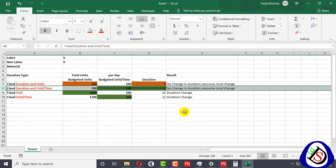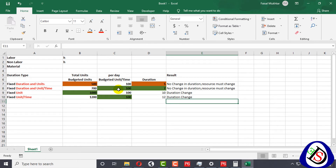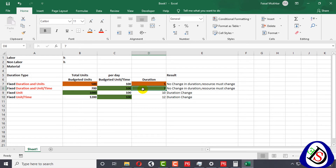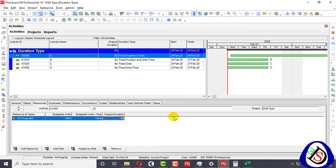Now for the second case: Fixed Duration and Units Per Time. In this duration type, both duration and units per time are fixed, but budgeted units are not fixed. Sometimes you have resources and a known timeframe, but your final budgeted units are not yet determined — you need to calculate them. You have excavators and a duration but haven't finalized your units.